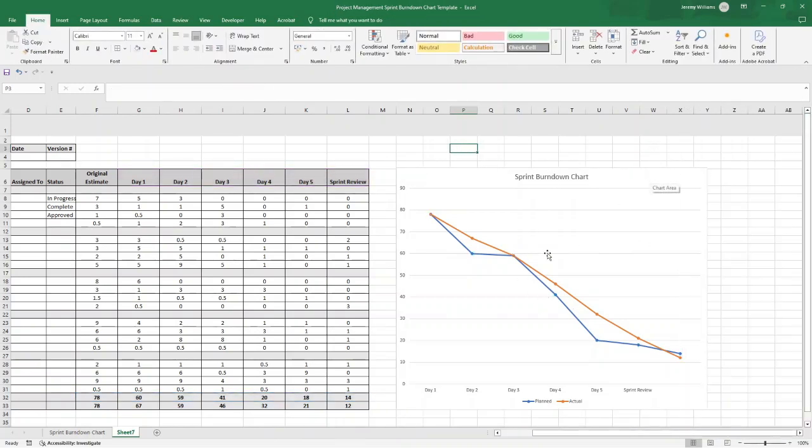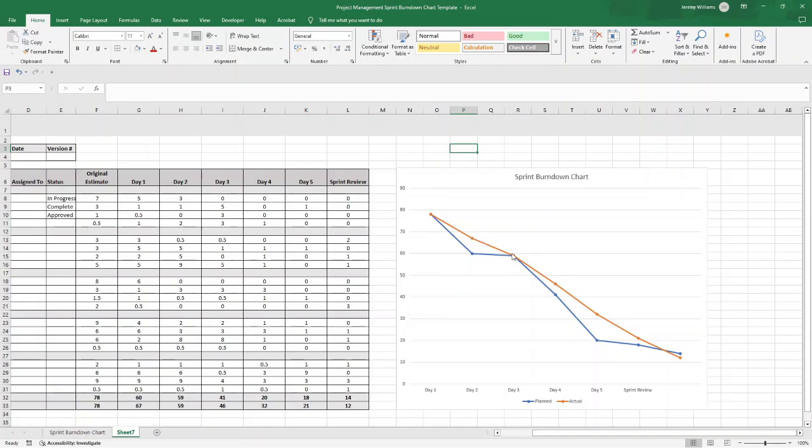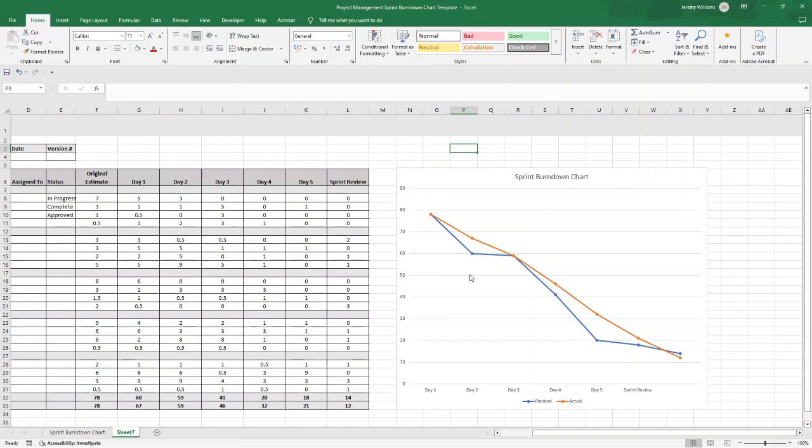Now you're probably thinking, what is this showing? Let me just walk you through this because I think that's really important. Basically, this is visually showing your team's progress throughout the sprint. So the orange line shows your actual remaining work, while the blue line is essentially the ideal burndown rate. So you can quickly see if your team is ahead of schedule, below the ideal line, or falling behind, above the ideal line.